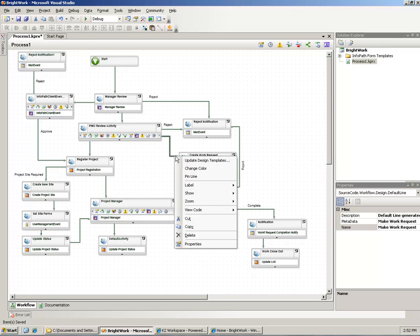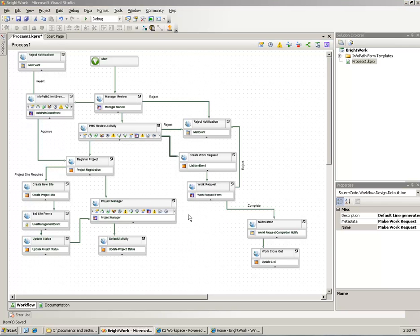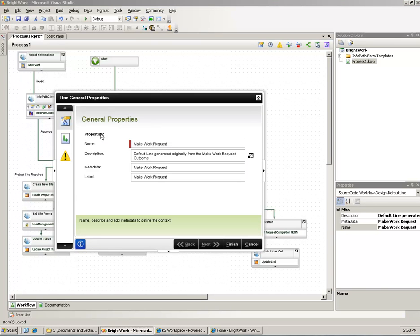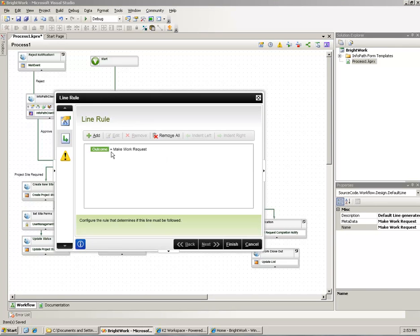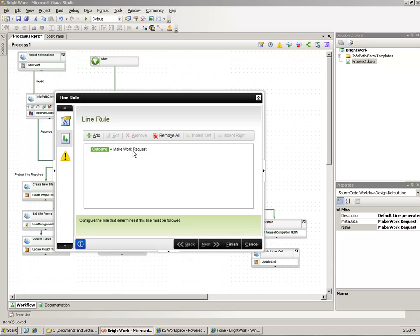The other thing that can happen is I've also added this make work item. We kind of discussed this briefly, but what I wanted to have happen here was if this goes to the project management office for review, they can actually say this request doesn't meet the criteria for an actual project, so we're going to make this a simple work request, and it will go through the path of inserting those list items into the work request area.